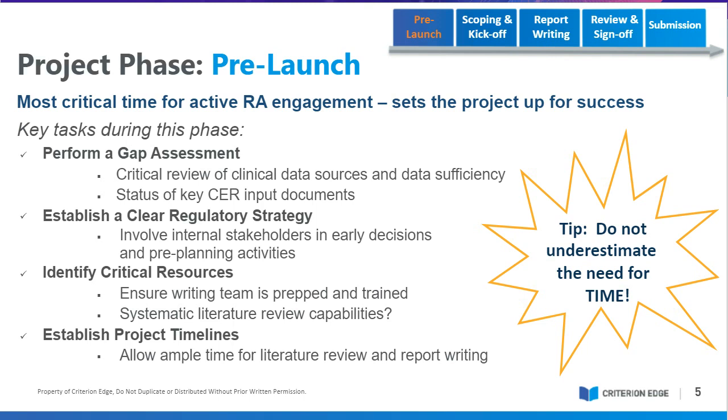And so be very specific about your systematic literature review capabilities, because it's data that you're looking for. And if they question your systematic literature review methodology, they will question your data. So that's a very important aspect as well. And time, we're here talking about time today, and please allow ample time. Literature review and report writing are the two single most time sucks in this whole process. Other than delays created by maybe your internal lack of preparedness or changing, that's another time suck as well. So that's why I cautioned you all, do this gap assessment, do this pre-launch, get your ducks in a row, because once you start the clock on the report writing, you've only got so much time after that. And my tip is, you'll hear me say this a lot, do not underestimate your need for time. It's better to have more than less.